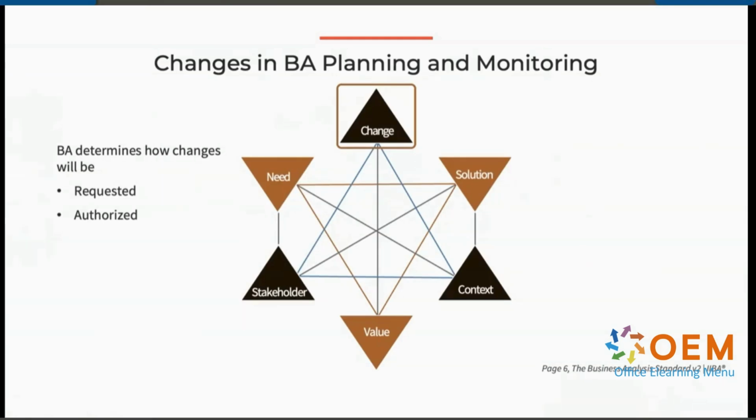No matter how a change is requested, the business analyst will analyze it to determine the impact on other requirements and the scope of the solution. The business analysis plan will include the process and identify who will authorize the requested changes.